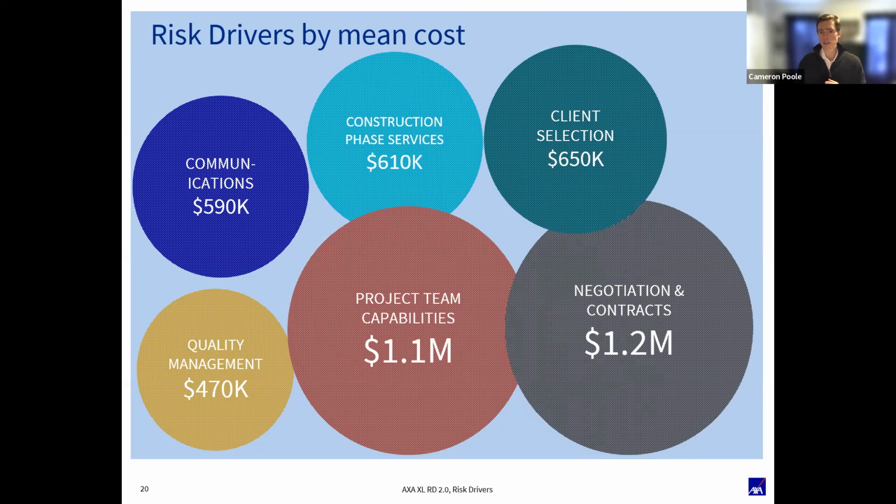Anytime you sign a contract with an elevated standard of care, that's potentially going to be a very large claim, and it can be as basic as one word, right? They can just stick the word highest in there. Or what I see in a lot of contracts is owners will, instead of tying it to your locality, say you'll perform to the level of a nationally recognized firm, right? Something like that. Now we have a claim come in, we have a lawsuit come in.